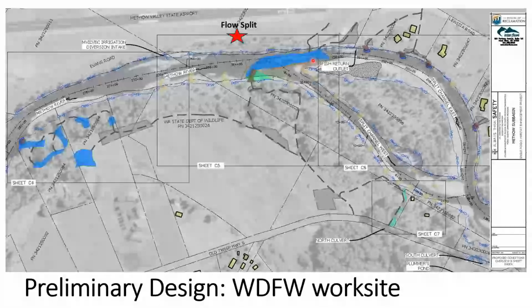We expected that at the moment we took out the dam and started the project, we would be back doing adaptive actions and building that process to let the river expand its development reaction so that we didn't try and do the entire project at once. So what you're seeing here is really the philosophy that Mount Salmon brings, continuing to engage with the site until we've reached the potential of the site.